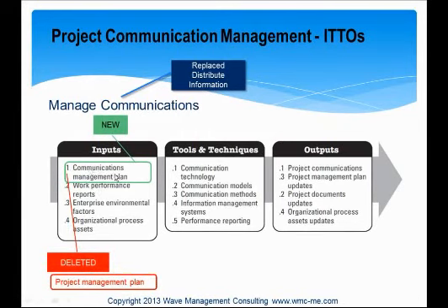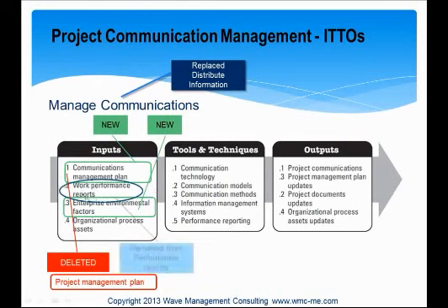So in the inputs we have communications management plan, which replaced the project management plan. They also introduced a new input, which is the EEF. They renamed performance reports to work performance reports.